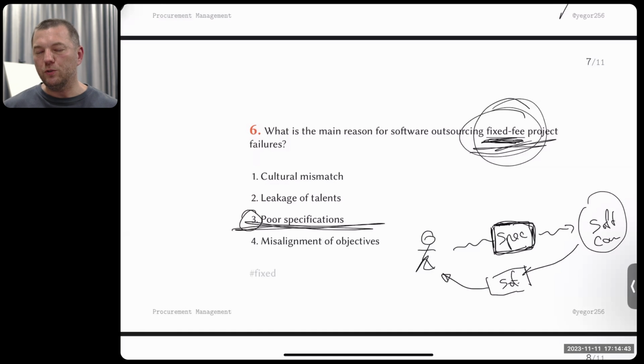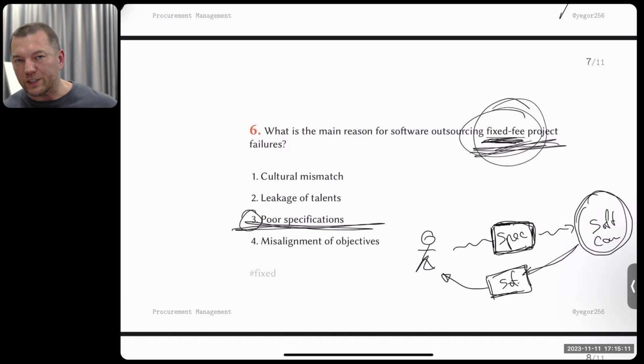It seems that you as a project manager should try to sign it this way and say, well, I pay them the money and they guarantee the delivery of the software. They don't guarantee. It will be very difficult to get from them the software that you are looking for. In this case, they will spend most of their time fighting with you over specifications instead of writing the code. So instead of coding, they will always try to protect themselves against the potential court case where you will go when they fail to deliver the software, and they will fail.